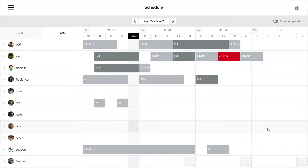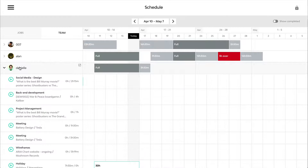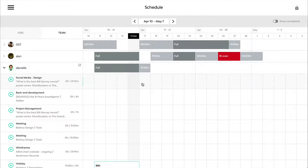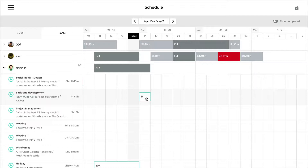I'm going to cut in and quickly show you scheduling because it's a new feature we've had to insert into this demo. This feature is only available with our premium price plan, and it allows you to look at team capacity, staff availability, and it has a Gantt drag-and-drop style setup. For example, if I open up Danielle's jobs, I can see the tasks she's working on and what her capacity is like. She's got 3 hours 30 capacity for tomorrow, and if I want to schedule something in for her, I can simply click into the area I want her to work on and drag my mouse up to make that full assignment.